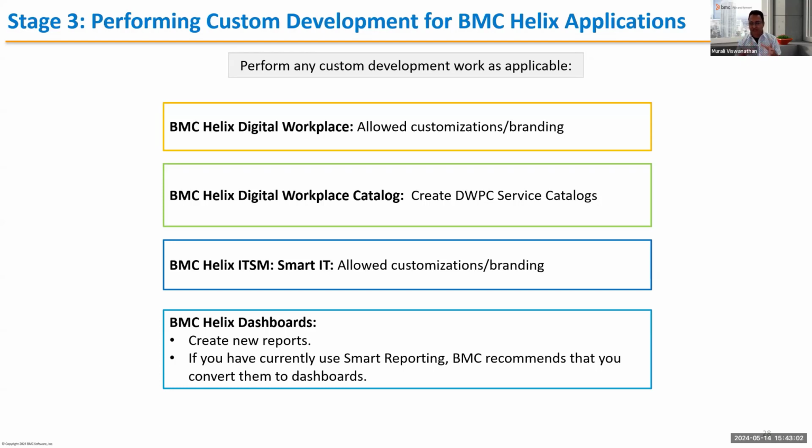And again, we don't want you to go crazy on this because you're still in a migration project. We want you to go live first and then leverage a lot of new features and functionalities, and keep pushing things from dev to QA and prod after you go live. But there are certain things you can still do. You can bring in your customizations in Digital Workplace and the Digital Workplace catalog. You can create some new catalogs if the customer needs them. You can create some new reports. All that is good because we don't expect this to get in the way of your integrations or affect your data, since these are all new things you'll be creating.